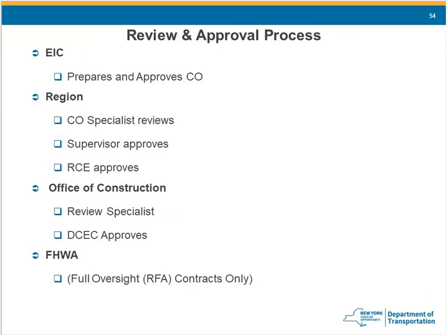And it really needs to be checked by someone else. You can go cross-eyed and a little bit batty inputting all the items and quantities and explanations for a change order. Have someone check your work before you submit it to your region. Some regions handle things differently. Some regional change order specialists will review the change order while it is still in draft status. Other regions require you to submit the change order in pending status before they will review it. Find out what your region's procedure is for that.